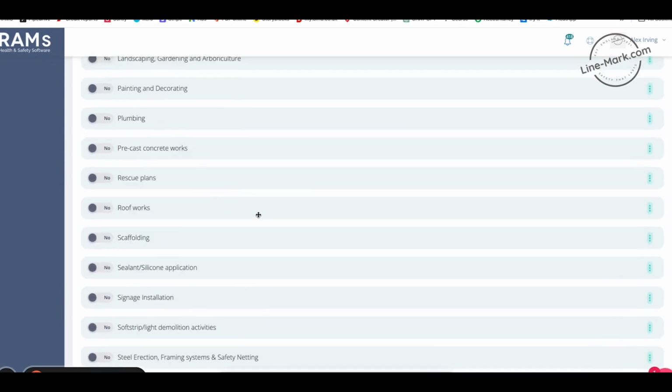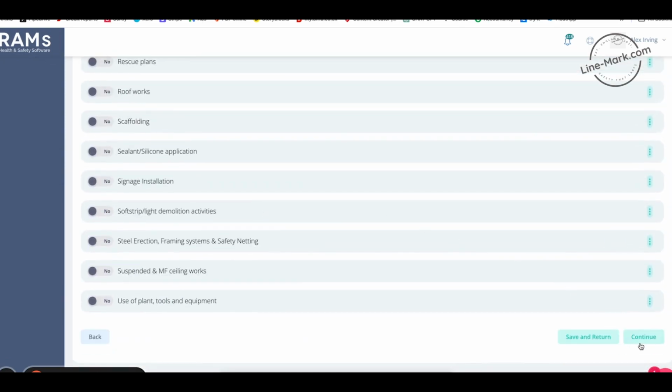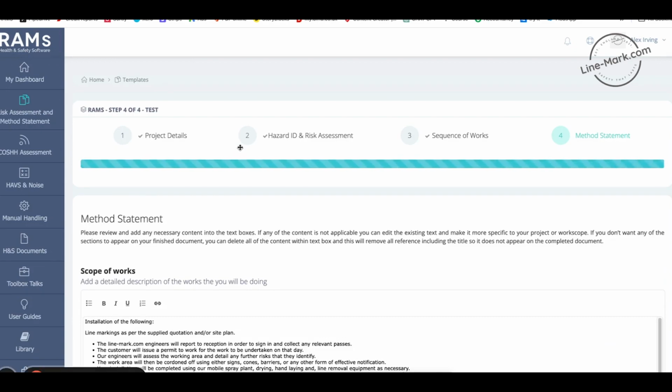So for example, we're arriving on site, we're filling out the induction paperwork, we're getting the permits in place. Next, we're going to start work, or we're going to do a site inspection or a pre-inspection, carry out our installation, then we're going to be tidying up, then we're going to sign off the permits and close down any licenses that we've got open as well. So all we're going to do here is write down that sequence of activities. Again, we'll just continue with these ones.